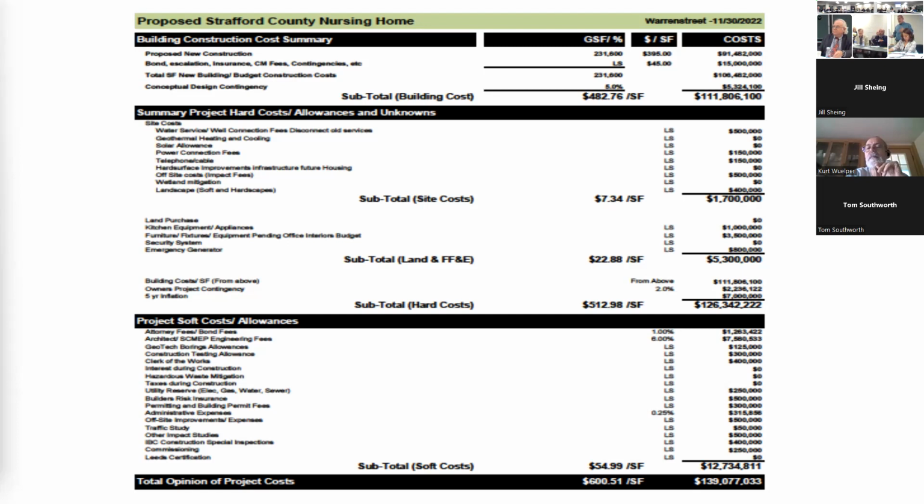And now we're into a new delegation. That project they could have bought 20 months ago for $45 million. They just signed an agreement with Harvey Construction for close to $78 million. It almost doubled in 20 months. If you guys kick this can down the road, it's going to cost more. That's what it's going to do.